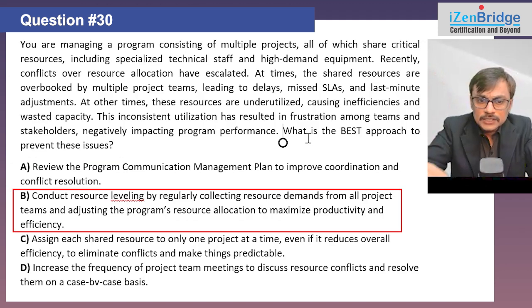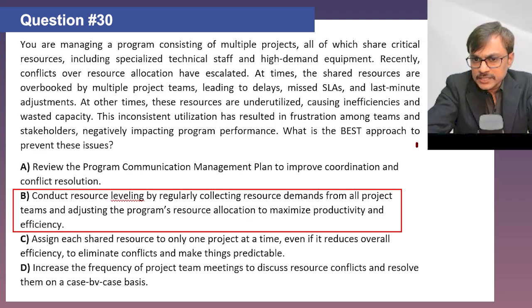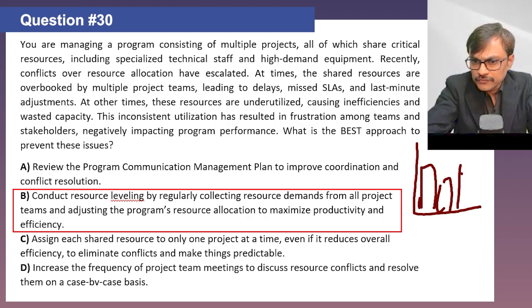Option B, conduct a resource leveling by regularly collecting resource demand from all project teams to ensure the program's resource allocation to maximize productivity and efficiency. So we understand resource leveling is a tool which we use to get these things resolved. You probably have clarity that we use a resource histogram where we see how particular resources are used over a period of time.